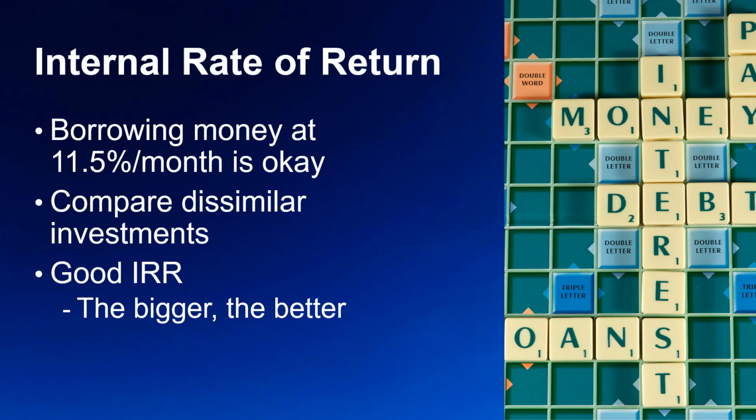Although an IRR greater than 0 is okay, it's relatively easy for anyone to go to a bank and deposit the money in an interest-bearing financial instrument like a savings account or a certificate of deposit, a CD, or a time deposit. Therefore, a project is a good investment proposition if the IRR is greater than the common rate of interest that could be earned by a prevailing risk-free interest rate for the time frame of the investment.